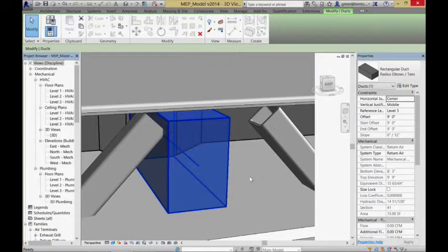It's incredibly useful for actually finding out conflicts long before they happen in the field, to really do some detailed construction planning and really see how something's going to come together. Because often our assumptions about the finished thing and how it's going to fit together overlook that we actually have to get everything into place in the right order and the right time to actually assemble it. I can design things that are sort of next to impossible to assemble just because of all the clearances and stuff like that. So it's good to think about really what the whole assembly sequence is going to be.